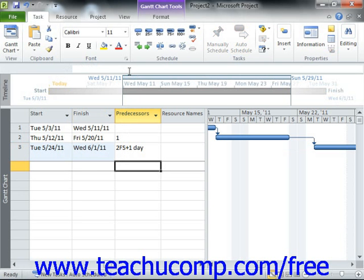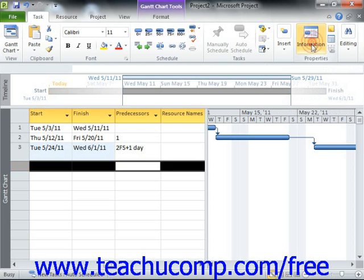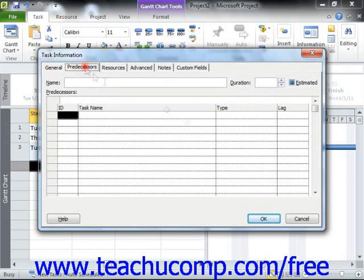Just as with lead time, lag time can be entered as either a positive amount or a percentage. Note that you can also enter the lag time and lead time within the task information dialog box, on the predecessors tab in the lag column.